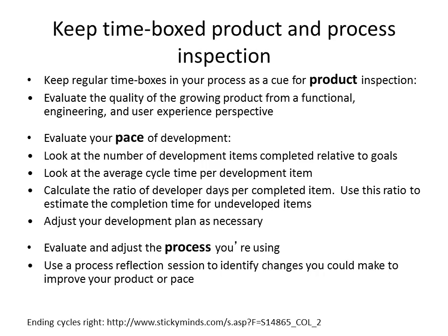So start the board by placing stories or features in the queue, which is basically the second lane. You see, the first one is the goals, the second lane is the queue, and you mark the date, or rather the product owner marks the date in which they expect each of those to be picked up and pulled.